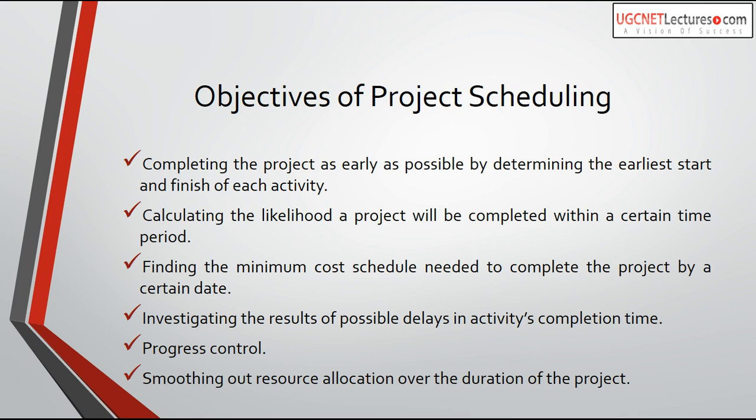It is not certain that an activity will finish in the allocated time. Any activity can take more or less time. If one dependent task completes late, the next task which depends on it will also start late. For example, if the assigned time for the design activity was 10 days but designing took 15 days, then the starting time of coding will also be delayed by that amount.